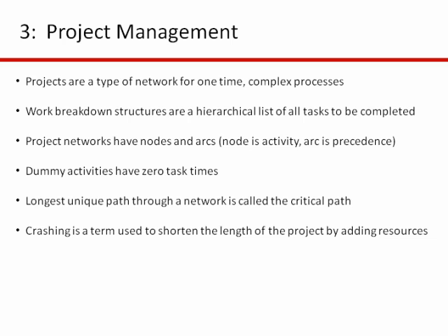We're going to represent projects with networks, and networks are like processes. They have nodes and arcs, and so we're going to use the activity on node representation of our networks. So each node or circle will represent an activity that needs to be done. And then the arrows or the arcs will indicate the order that the activities need to be done. We won't really need to worry about dummy activities because we're not going to be dealing with activity on arrows, and that's pretty much something that is specific to that type of convention. So I wouldn't worry about that fourth bullet point.